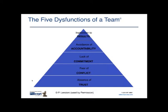The fifth and final dysfunction is inattention to results. In a team with an absence of trust, fear of conflict, lack of commitment, and avoidance of accountability, you will not pay attention to producing what you're supposed to produce. This is often the classic tip of the iceberg — when a team seems not to care about results, it's usually a very clear indicator that there are four dysfunctions underneath driving that behavior.